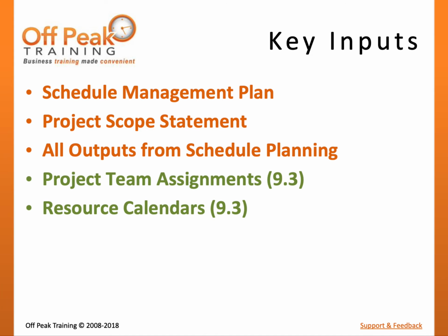Project team assignments and resource calendars represent the individuals that have been assigned to schedule activities and their calendar of availability. This information will be determined as a result of the acquire resources and conduct procurements processes. While these individuals may not be known when the schedule is first created, the develop schedule process can be revisited once the team has been acquired.